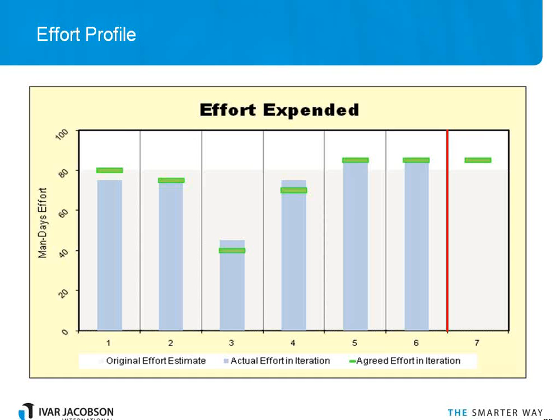When we're looking at effort, what we actually like to do is we have the initial estimate that we did when we set the project up, and then each iteration we like to do an estimate. How much time are we actually going to have, guys? And that's what the little green lines are showing. So when we went to the first iteration, we expected to get 80 man days, and we fell a bit short. We looked at it, so the second iteration we estimated slightly below 80, and we hit that one on the nail. When we got to the third iteration, which is where the holiday should have been, we actually managed to get a little bit more effort than we expected.